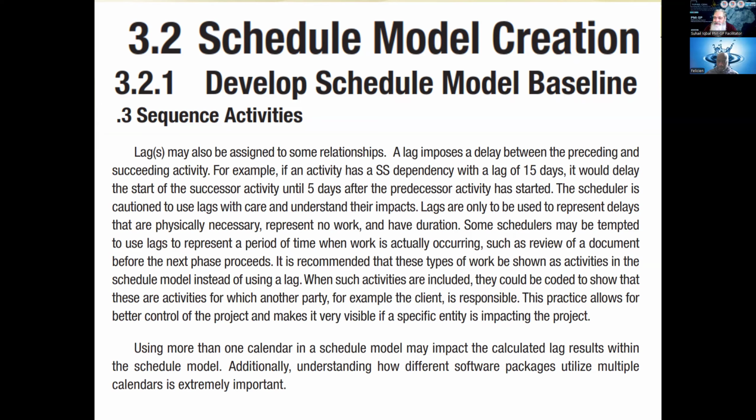You understand my point? Yes, sir. So if the approving authority is not giving the approval, then they should speak up within those 3 days and stop the work. If they don't say anything, then it will be considered approved legally. Let us make it a part of your contract when you are doing such kind of activity, so that the people who are giving the approval do not relax and do not delay your project unnecessarily.